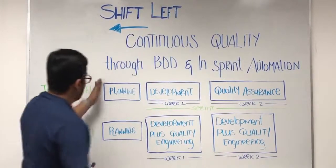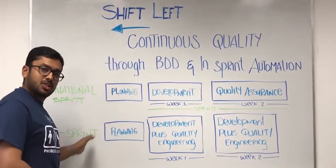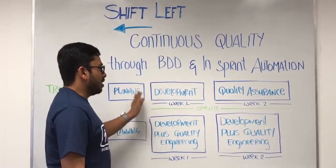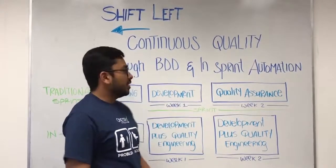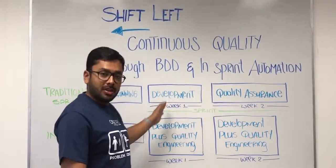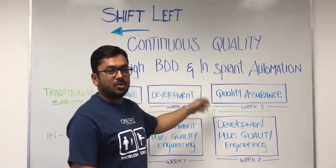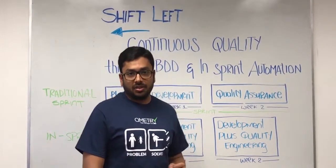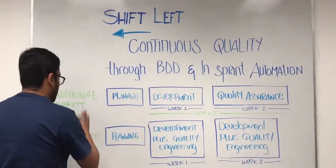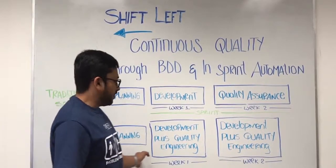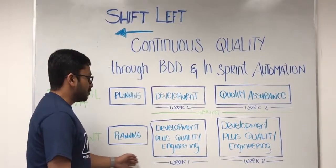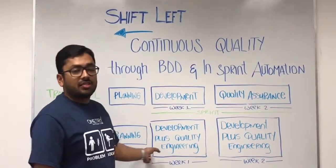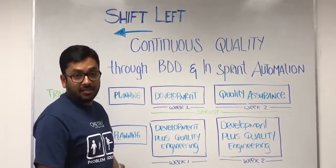At the beginning of the sprint, in both the traditional as well as in-sprint, we have the sprint planning phase. Once the sprint planning is done, in our traditional sprint, say if it's a two-week sprint, it's a staggered approach where our development team starts working in week one and towards the later part of week one, the QA team will start working on QA activities. Whereas when we talk about in-sprint testing, as soon as the planning phase is done, or even during the planning phase, you involve the QA or quality engineering team, which can give you insightful data points right from the planning phase of the sprint itself.